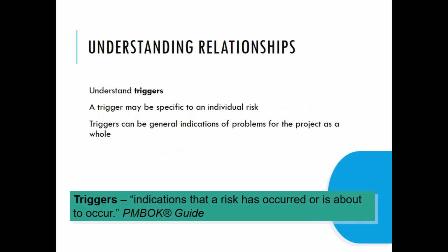The 7-step approach to manage a risk is: identify the risk, classify the risk, analyze the risk, price the risk or give a score for each risk, prioritize the risk, then response planning. We need to have a response planning for each risk. That also talks about a contingency plan. Then we need to monitor and control the risk as a seventh point. These are the 7 steps in managing a risk.